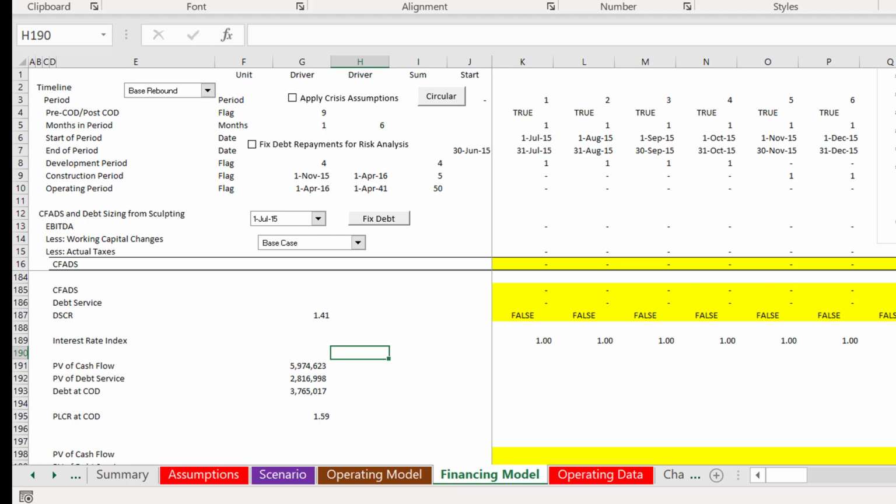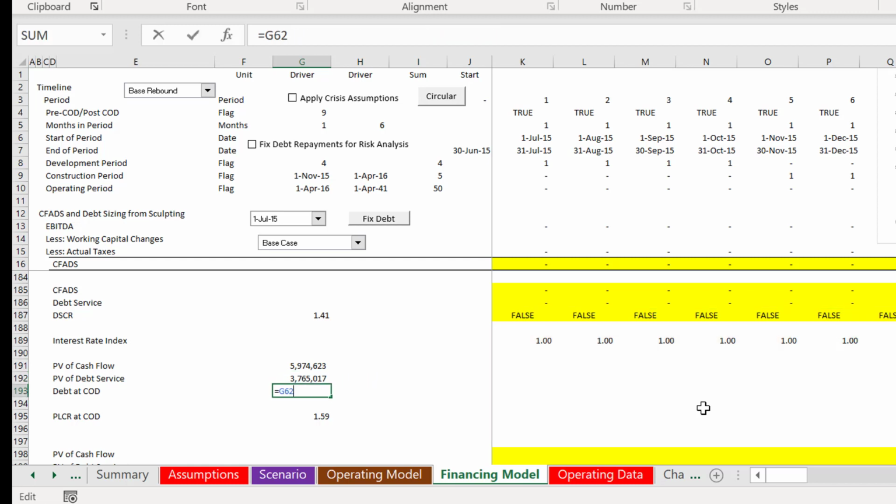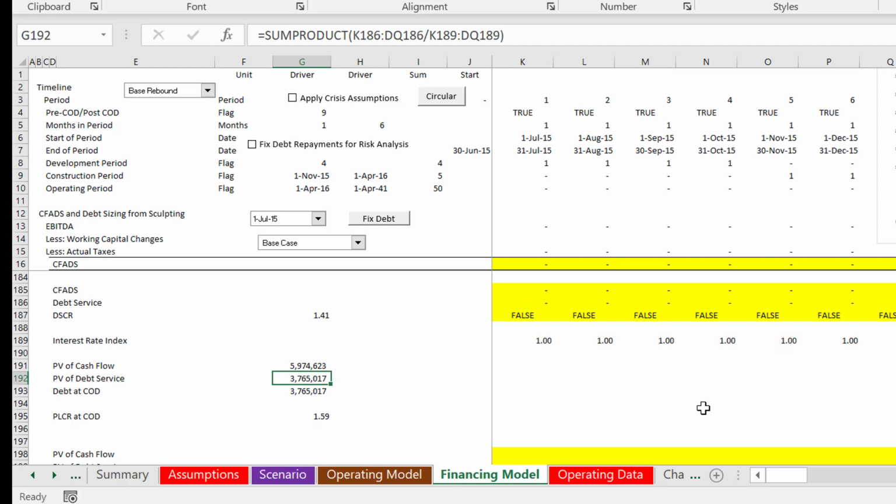I'm going to have to pause the video again. I'm going to have to cut out a lot of this, aren't I? If I take the NPV of the debt service or I take the debt at COD, that's the same thing because I just put sculpted in. My lesson here was to put a 0 cash sweep in, because the cash sweep is part of the debt service, and you better be careful because then you can't take this one.